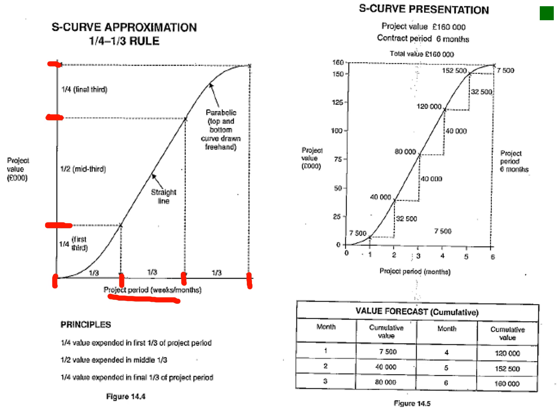Okay, so they just made an example here of how it will actually look, and you can see that this principle is more or less the same. So this is a very quick way of getting to a cash flow projection. Usually when you check cash flows given to you by contractors, this is also a very good way of just checking whether their cash flows are actually within the ballpark.